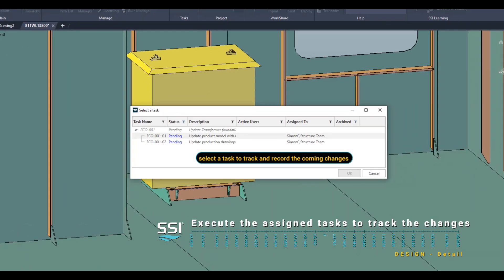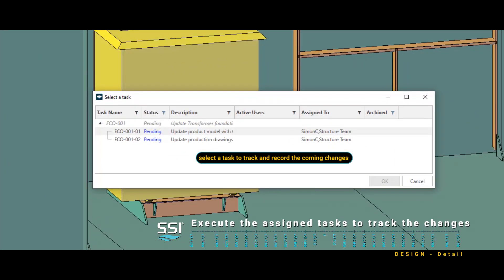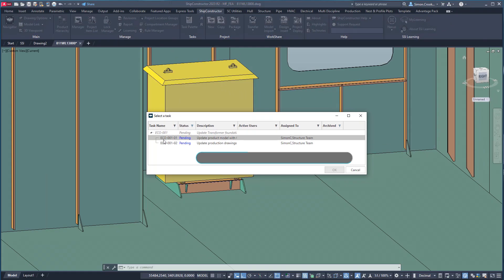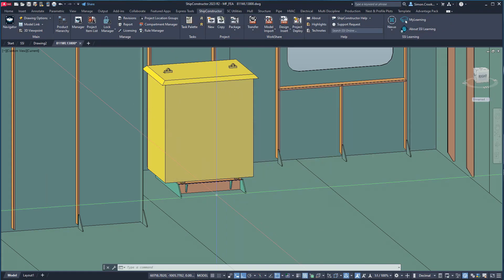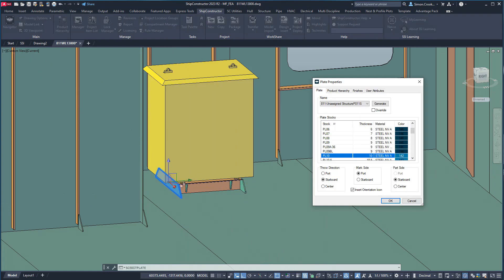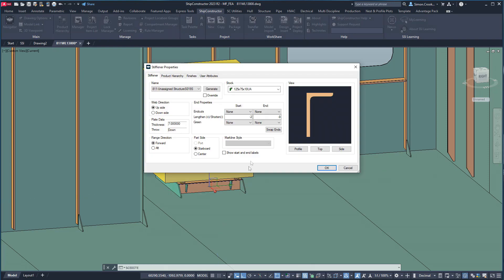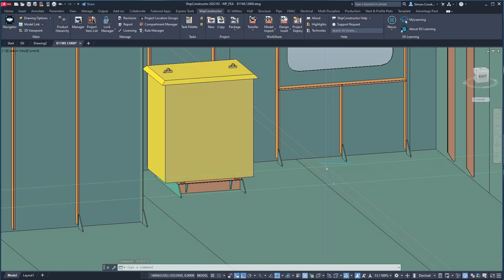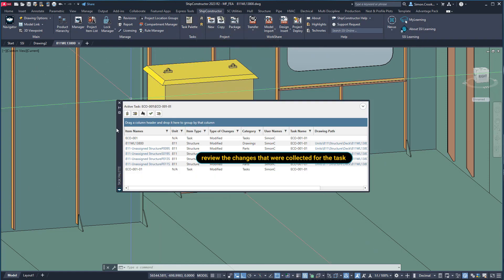When the ECO gets to the design team, it is in the form of tasks which will capture the changes made. For this ECO, the work is broken out into two tasks: the first task to update the model, and the second task to update the impacted production documentation. As the design team makes the changes, each step is recorded against a task all the way down to the level of specific parts.